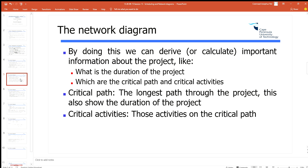From the network diagram we can derive two main sets of information. The first is the duration of the project — we need to know how long the project takes to complete in a planning sense. The second is which activities are the critical activities, because those are the ones we really need to look after. The critical path is the longest path through a project, and that gives me the project duration. Critical activities are those on the critical path — if you delay any of them, you delay the total project duration.